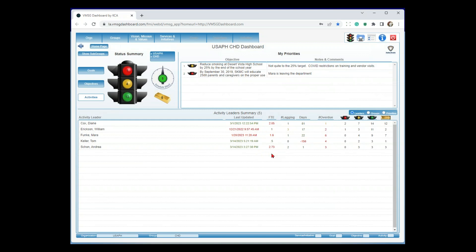At the bottom, I have three different views. Number one: activity leaders — those folks assigned as activity leads appear in this column. The first thing I see is the last time this person updated the information. Green means less than 30 days ago; yellow is 30 to 60 days; red is over 60 days. Ideally, everything is green so I know I'm working with real-time information as I do my check phase on PDCA. There's also a rollup of FTE — Diane is doing the work of a little over two people; William is at 1.0, which is where you want to be; Tom is at 0.5. You can click and adjust assignments to balance everybody out at about 0.9 or 1.0 FTE.